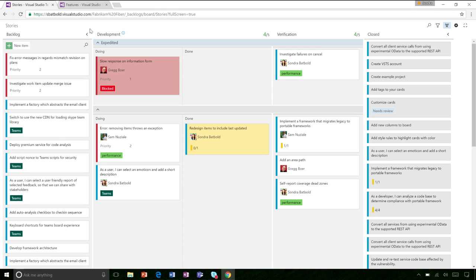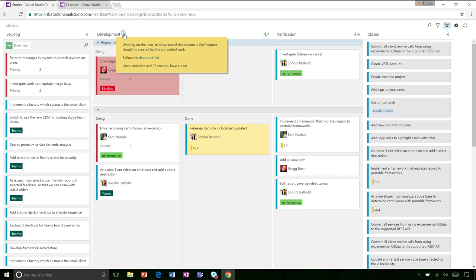The nice thing about the doing and done columns is that when something is in the done column, it lets the rest of the team know visually that they can pick up that work item and take it into verification. That's an indication that you can pull it forward into the next column. Does the stuff in the done side affect my WIP limit? Yes it does. The way team members know something is done is by looking at the definition of done — something the team can agree to and set a standard for.